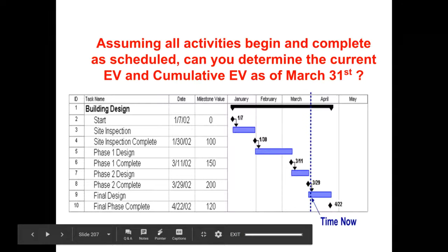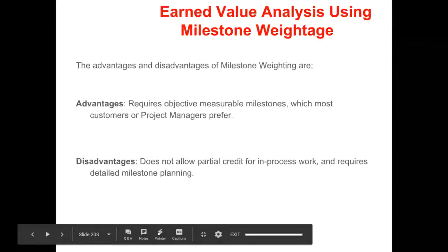So we are talking about a cumulative value. So Aaron, you said 450. Yes. You can see there are 4 diamonds on the left, and if we look at the monetary value of all of those, basically the answer should be 450,000 pounds earned.